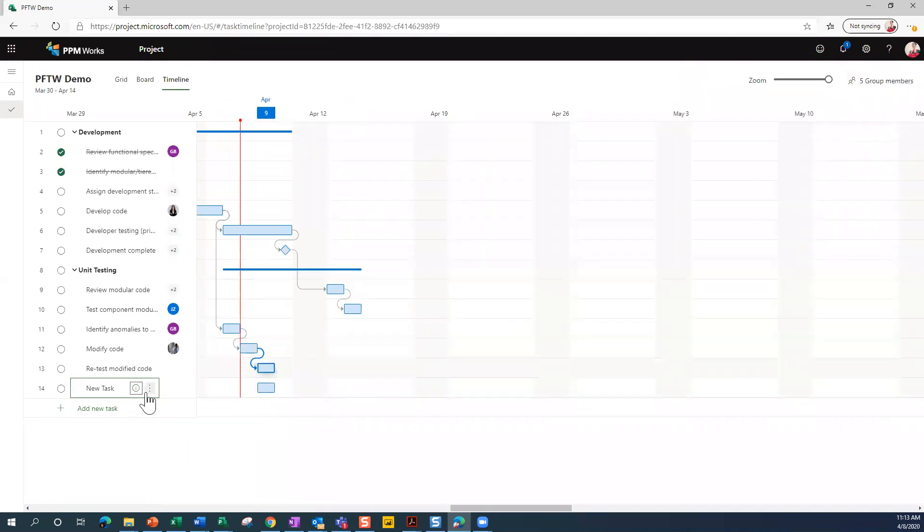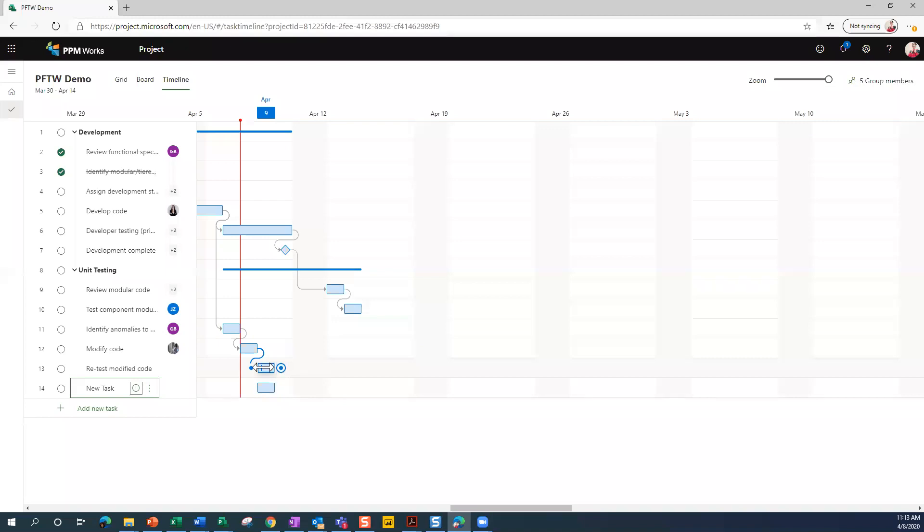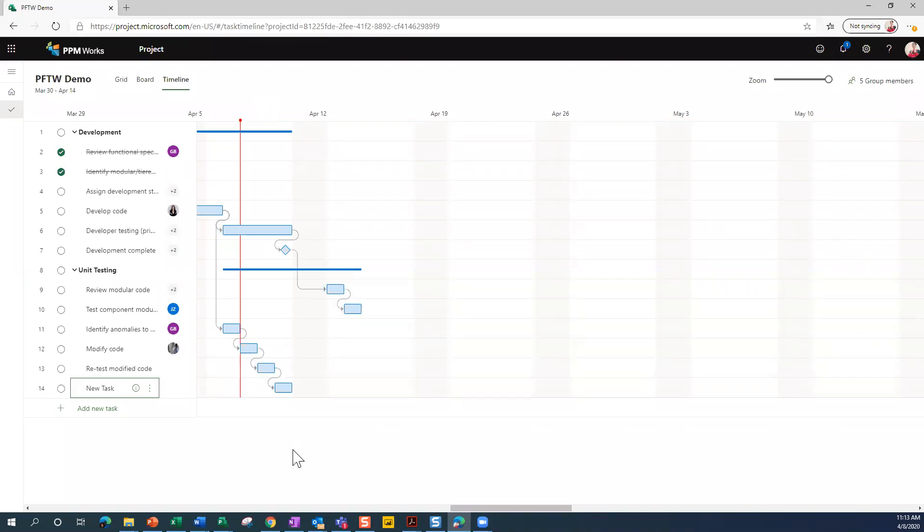So now that we have that task bar there, we've put that duration there. If you wanted to add dependencies here on the timeline, you just hover over the task bar and click and drag until you have the next task bar highlighted. And that gives you the same visual that you would get out of Microsoft Project. Again, it's just another way to display the information.